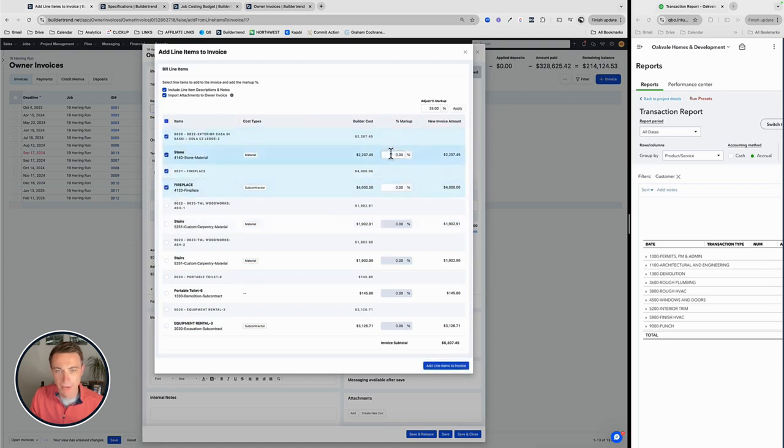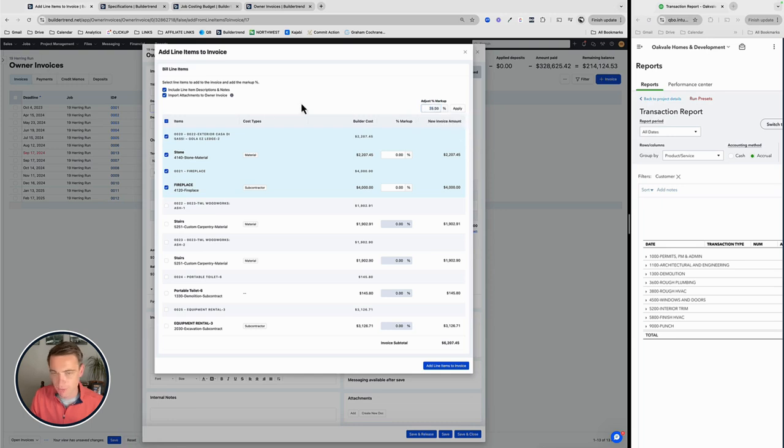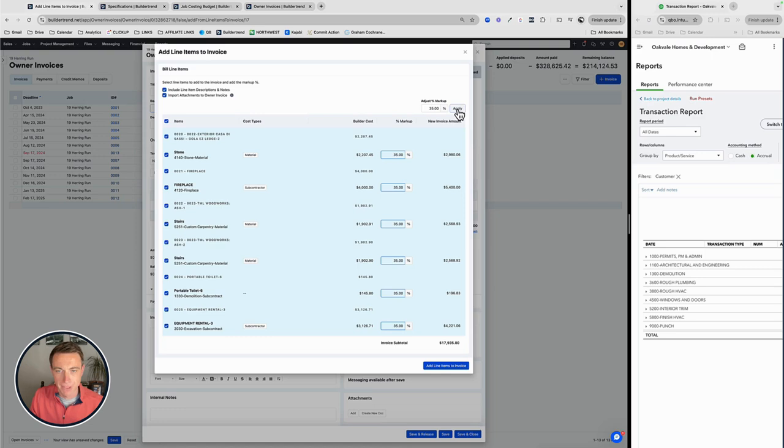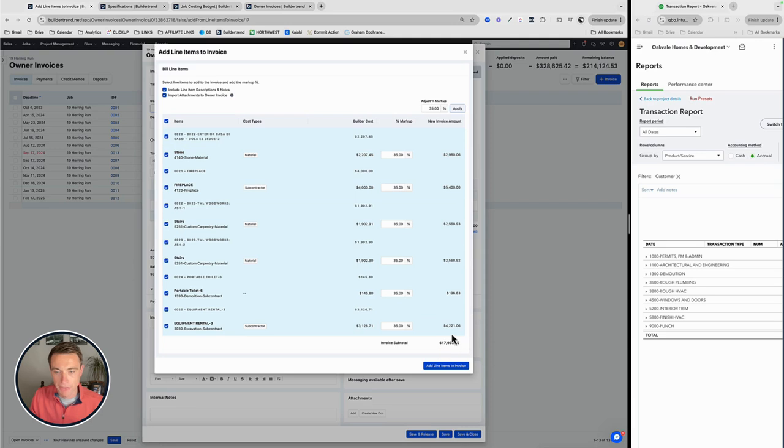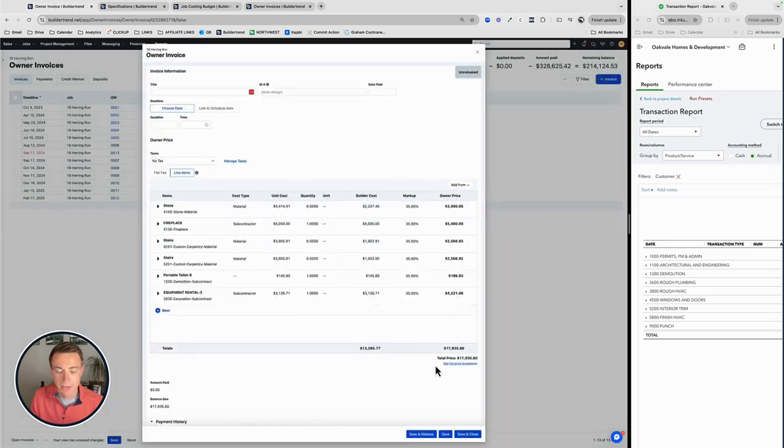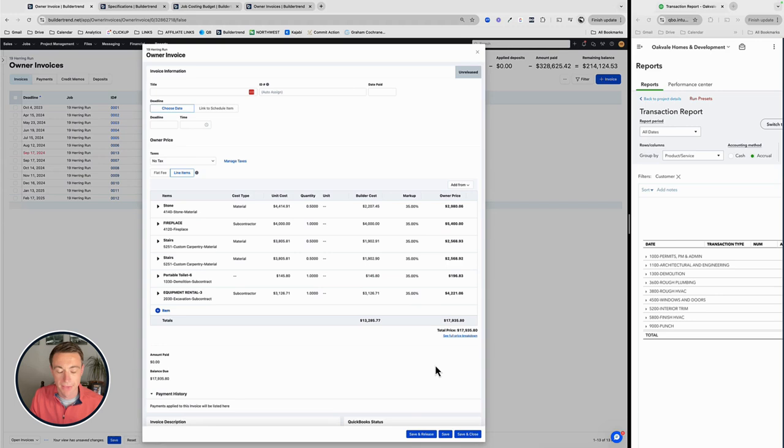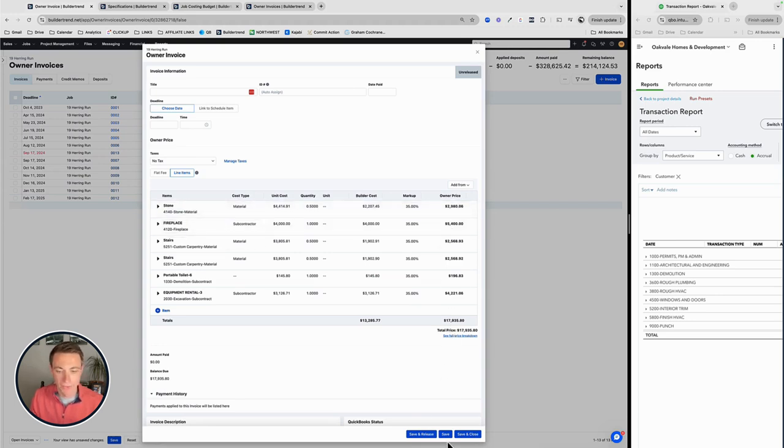If for whatever reason, some of these items are going to be marked up differently, that's fine. You can go through and say these certain ones are going to be 20%. The other are going to be whatever they're going to be. In my case, everything's going to be 35%. I'm going to go ahead and add that. So it's adding my cost. There's my markup. Here's my invoice amount. Here's my total invoice.